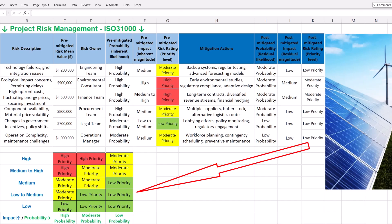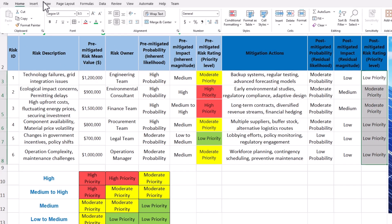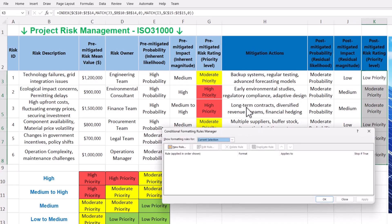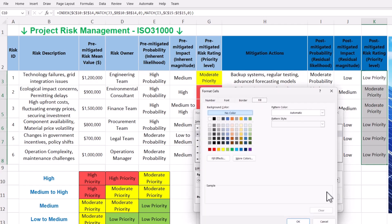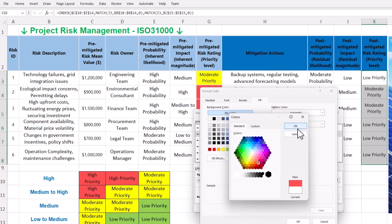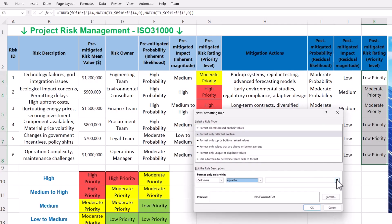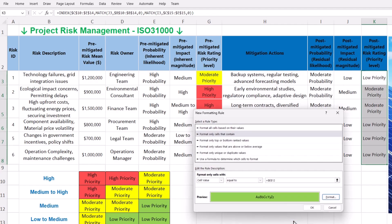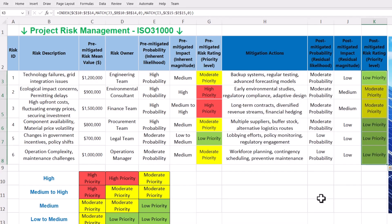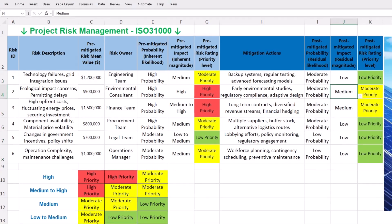We should color code the post-mitigation priorities similarly to the risk matrix theme using conditional formatting. Choose all risk ratings, navigate to the Home tab, and select Manage Rules under Conditional Formatting. Define a new rule for cells equal to high priority with a red fill, another for moderate priority with a yellow fill, and a third for low priority with a green fill. The color coding is applied by pressing OK and the animation of risk priorities is complete. If a new risk is added or impact and likelihood values change, the whole sheet updates dynamically.